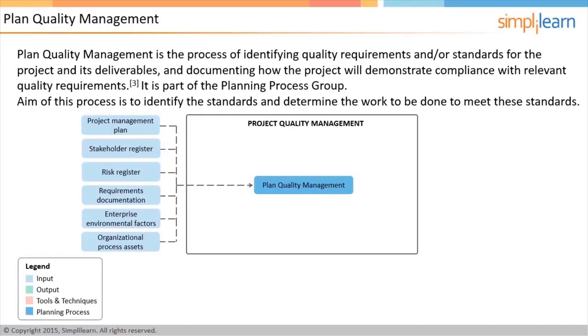To accomplish quality planning, first, analyze the benefits versus the costs of meeting quality requirements. Next, identify the cost of quality and confirm if that kind of investment in quality is justified. In addition to these two, benchmarking helps in analyzing the quality of activities of similar projects executed in the past. This helps in identifying the particular quality of output of the previous project, which in turn acts as a basis for the current project's quality planning.